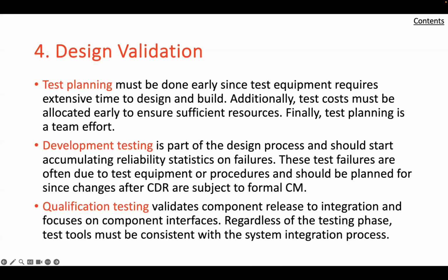There also needs to be some mechanism for change control. It will be recalled that the detailed design of a complex system is frozen and placed under formal configuration management. This means that thereafter, any proposed design change requires justification, evaluation, and formal approval, usually from a configuration control board or equivalent. Such approval is usually granted only on the basis of written engineering change requests containing a precise definition of the nature of the deficiency revealed by the test process and an analysis of the impact of the proposed change on system performance, cost, and schedule.